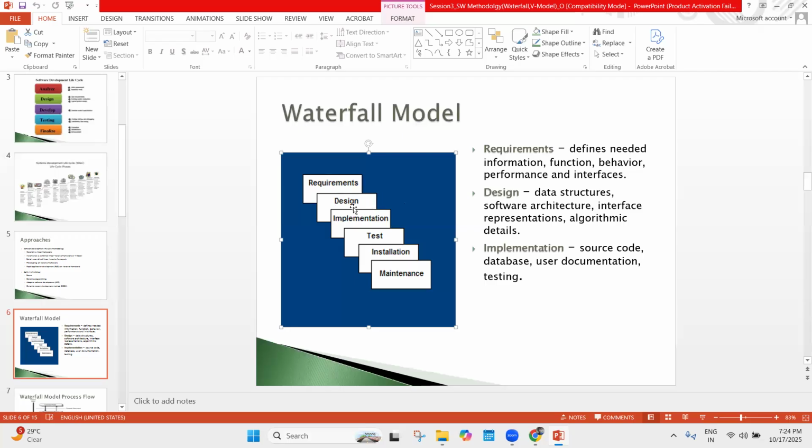Now the design team will work on everything related to the design, like UI design, screens, any CSS, styles, background designs, animations, or anything related to the design part. Once the design is completed, the implementation or coding team will come into the picture, where they will write the logic, whether it is .NET or Java or whatever it may be. Once the logic is completed, only then is the project allowed to move into the test phase. So this is the waterfall model.